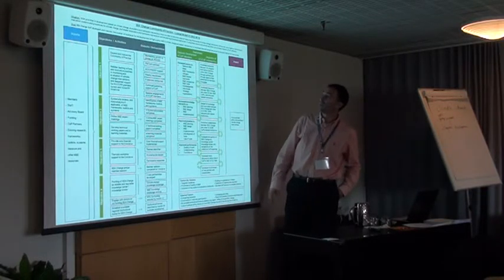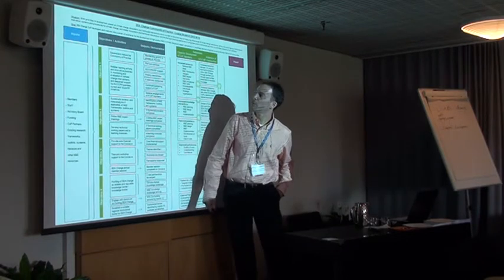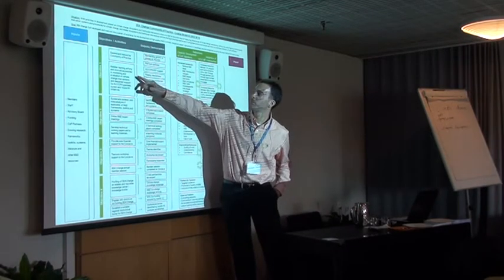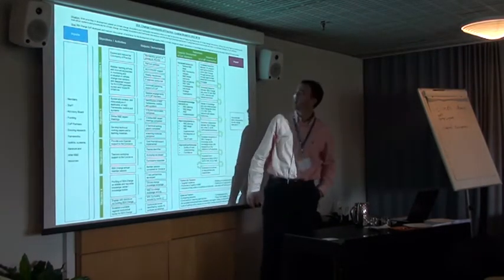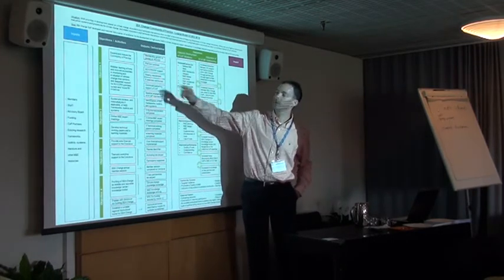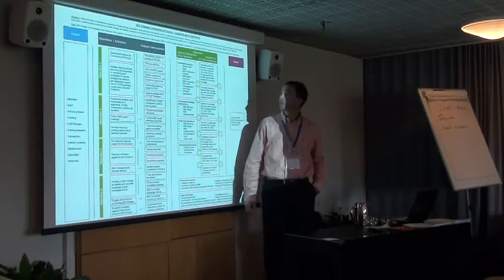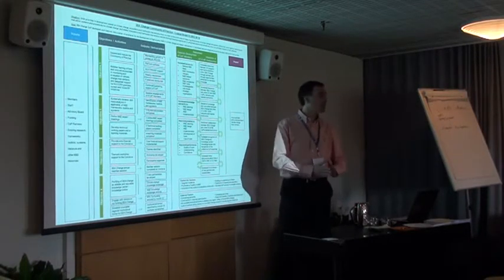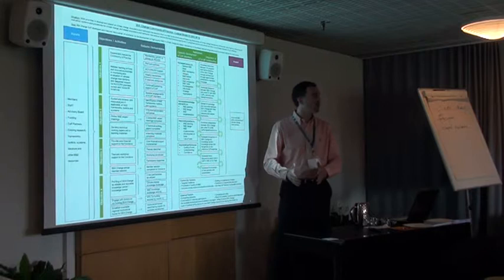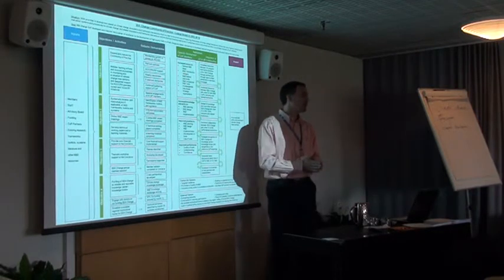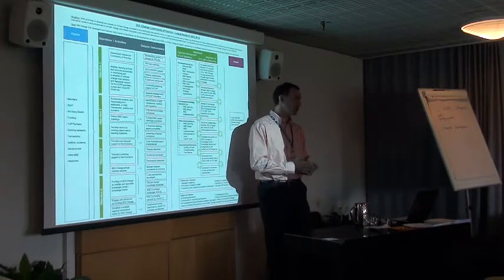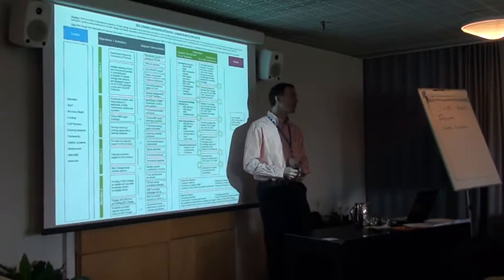As an example, one of the objectives is to mobilize learning efforts and innovative practices in M&E. And then one of the deliverables is that six webinars have been conducted. And for example, in reporting we have to show that the webinars have been conducted. We have to say something about the number of participants, and we do a post-webinar evaluation of how the webinar was perceived by the people who were taking part in it.